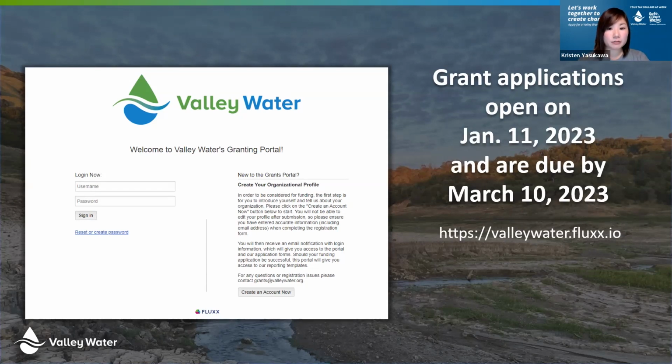For Valley Water permits, if you are planning a project that's going to be on Valley Water fee or easement, so fee is when Valley Water is the property owner, easement is like Valley Water has rights to that property but doesn't own it. So for example, PG&E has a lot of easement. Any land located underneath their power lines, they have easement for, so that they can conduct maintenance work. We typically have easement along a lot of trails throughout the county to do maintenance work of the creeks.